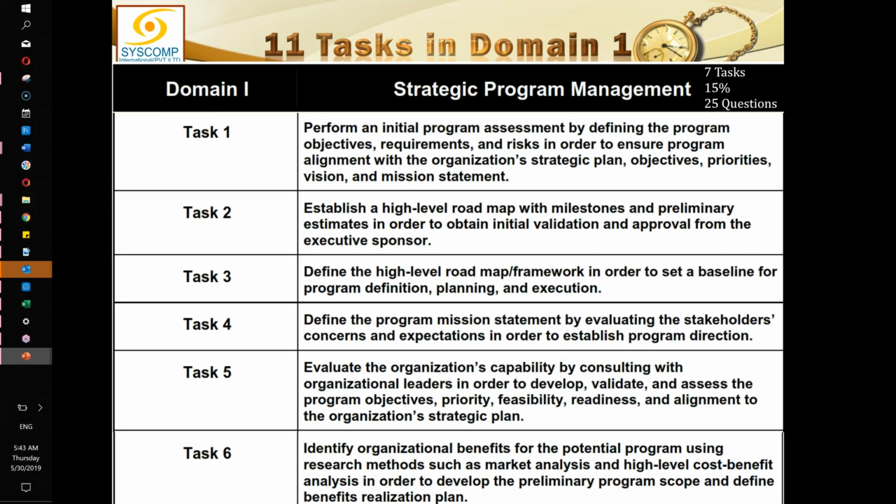We are seeking to have a baseline through that approval. So once he agrees with us that yes, I agree with your roadmap you have created, and the idea you have for conducting this program is generally approved by the executive sponsor, that means he has given the validation and approval, and now this is the broad baseline of that roadmap. Using that broad baseline, now I can set on further definition of program planning and execution.